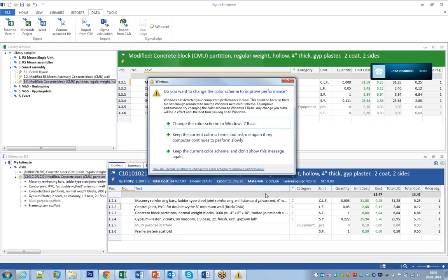So it's not like I'm selecting each subtrade independently. It's like I just checked off all these boxes in a question script like you had. These are the ones I need to get prices from. That creates an assembly or an estimate with all of those guys listed, where now I start taking prices, I start listing who the low subcontractor is, that kind of thing, and then I can start pricing my bid out.